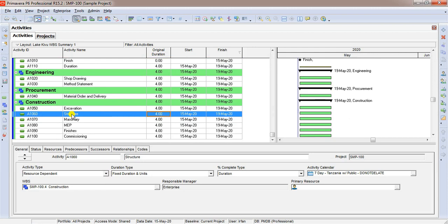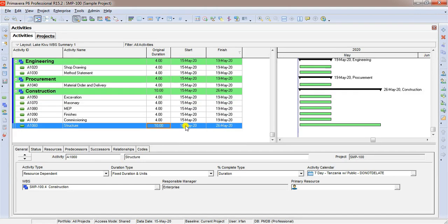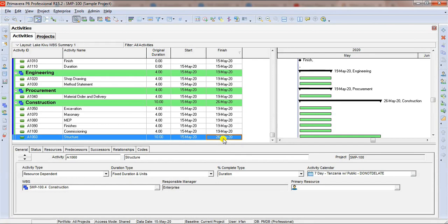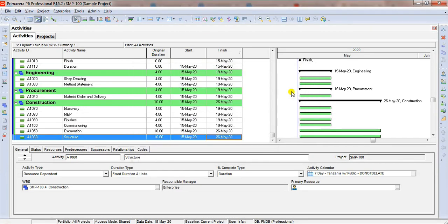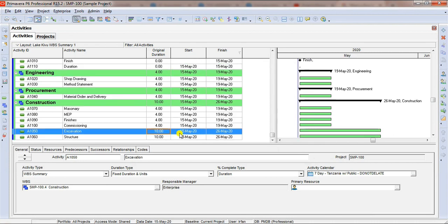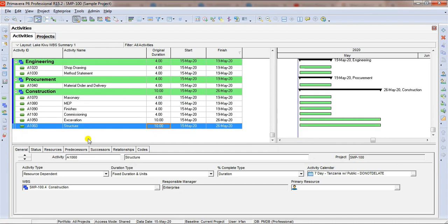We are going to change structure activity duration from 4 to 10. Press 10 and enter. If you see this activity is extended to 26th May because we increased the duration. Now, we need to run the project. A schedule is often required to run the project to forecast the duration and dates according to the changes being made in the program or schedule. This is the button to schedule the project. Click on the button. You may select the data date depending on your situation and requirement. Click on schedule. And see what happened. Excavation activity duration we set to 4, but it is extended according to structure activity finish date.